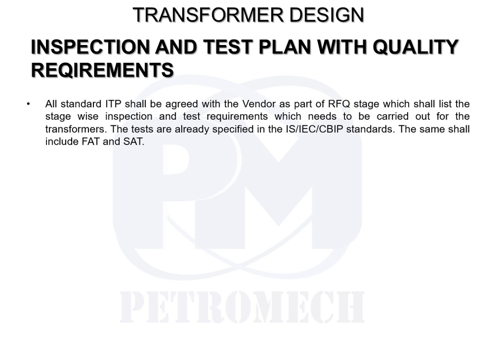There is a document which we popularly call the inspection and test plan, wherein all the tests, routine, type tests, visual tests, dimensioning checks, incoming material supply check, everything is listed in detail, which the vendor has to comply with at the pre-order stage, right? So that list has to be provided to the vendor in the offer stage itself, and